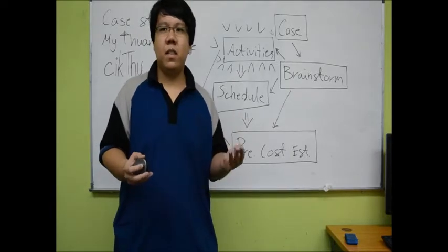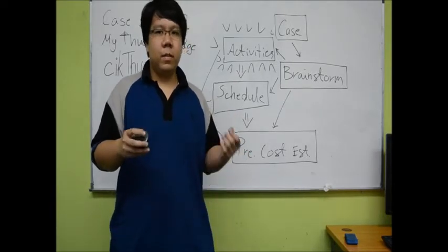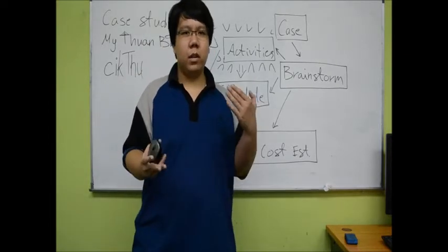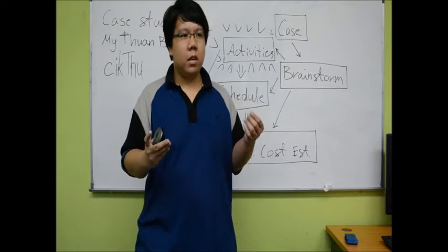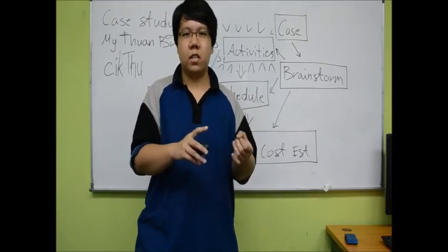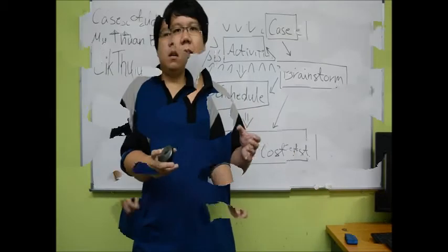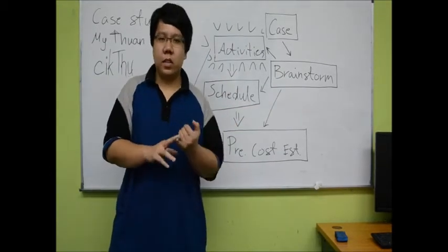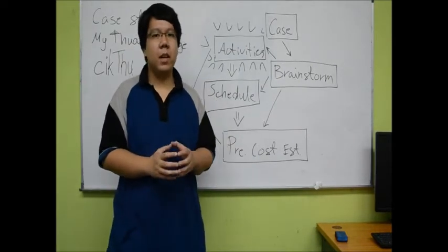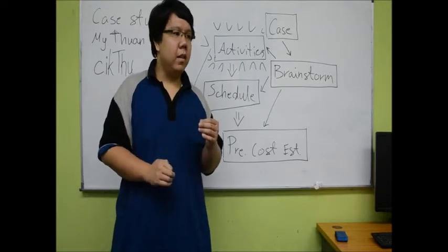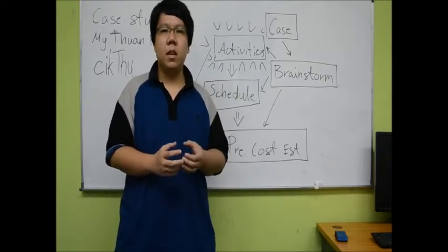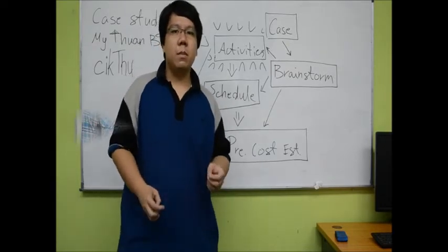And for the third phase, the creation of the construction contract, this phase is mainly for paperwork, whereby both parties have to come to an agreement and go through negotiation. This is very important so as to protect the interests of both parties. And finally the fourth phase, where the construction and commissioning of the bridge is conducted. The construction of the bridge is done by means of the cantilever method, and this process took around 41 months, including the defects and liability. And the next phase will be the commissioning.